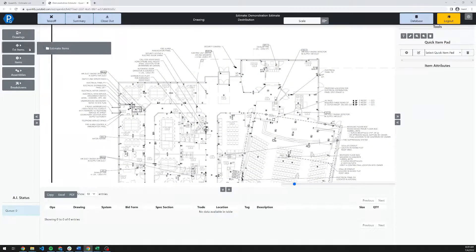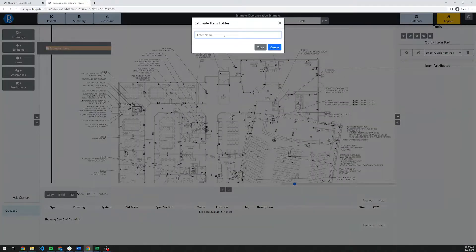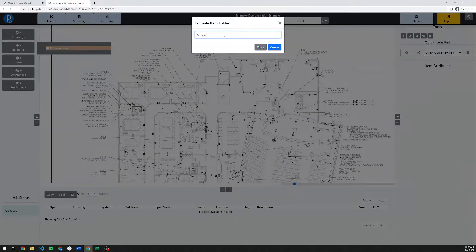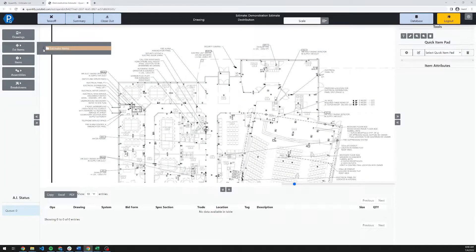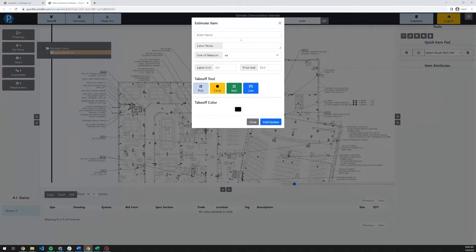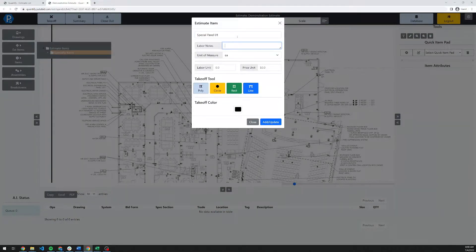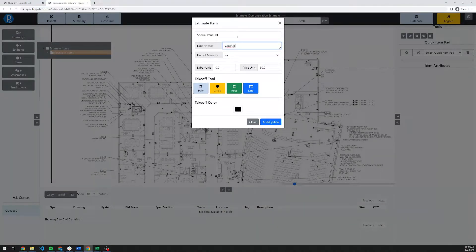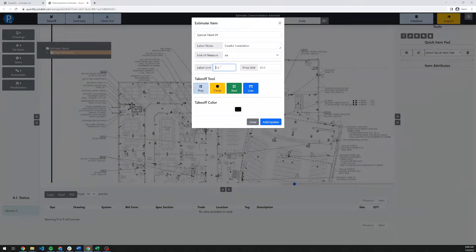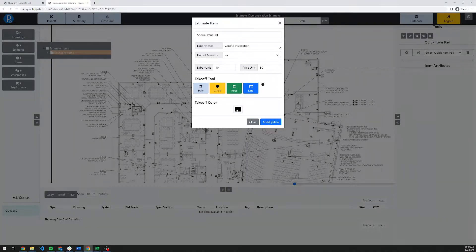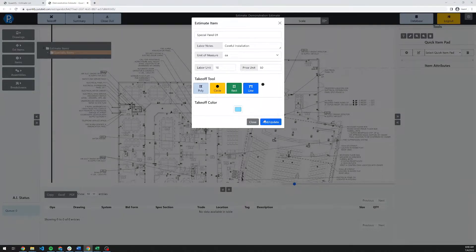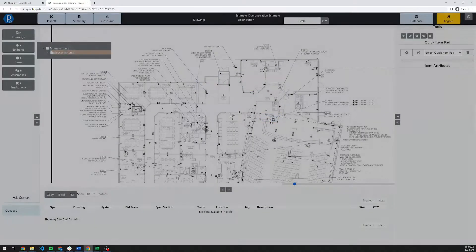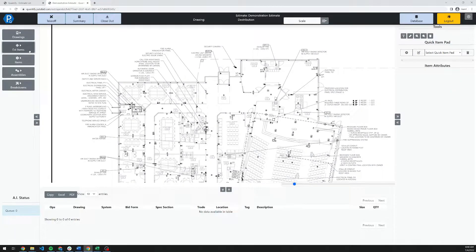Continuing down the left-hand side here, we have our estimate items. These are very simple, one-off, pertinent to this estimate sort of items that the estimator can create and assign individual values to. We can call this special panel 01, for example. We could add in some notes. And we can assign a value for labor and material, select the type of tool we want to use for its takeoff and set a color for it. Once you've created that, you can simply double-click on it and start a takeoff with it.